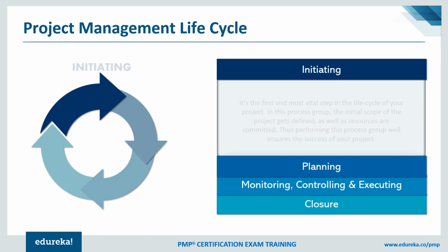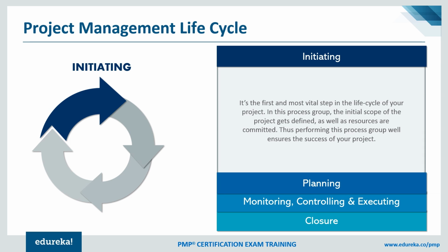cycles. When I talk about initiating, we said initiating is the beginning. Initiating is like when the project is getting finalized and we are finding out various resources. We are finding out the purpose of the project. Why are we getting into this project? What benefit can this bring into our organization? That's something which is done in the initial stage itself, wherein we do mainly two activities. First is finding out the business justification and preparing a charter document. And the second is identifying who the stakeholders are. So these are a few things which are done in the beginning itself for initiating.